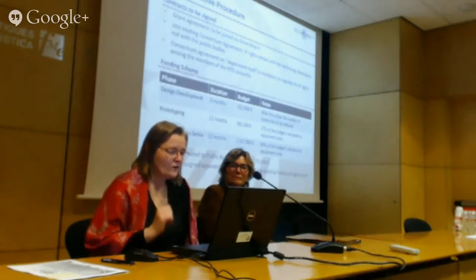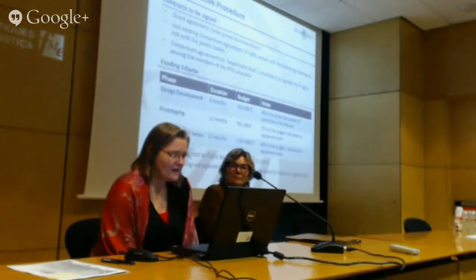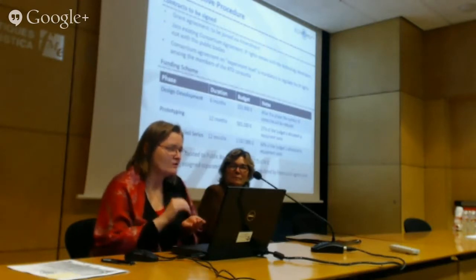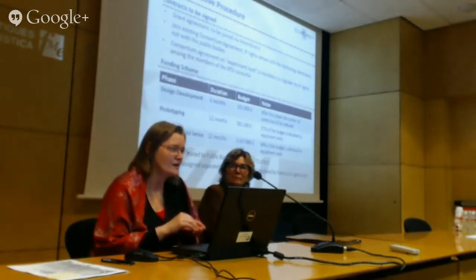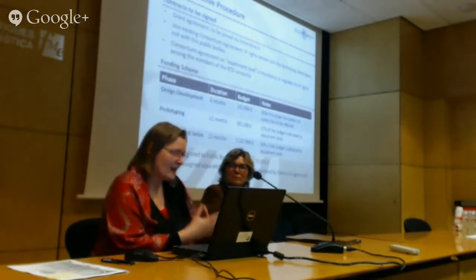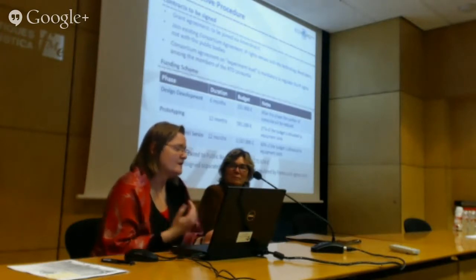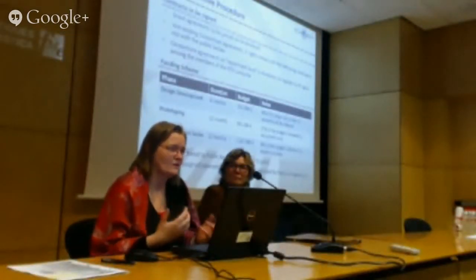So we have a consortium agreement in ECHORD++ for the core consortium, which stipulates that the consortium doing the technology development will have the IP rights of this technology development. It will not be the public body. It will be yours afterwards, and you can exploit that. The public body will be there because they are interested in using the technology afterwards, and they will help you to find a design that absolutely fulfills their need.